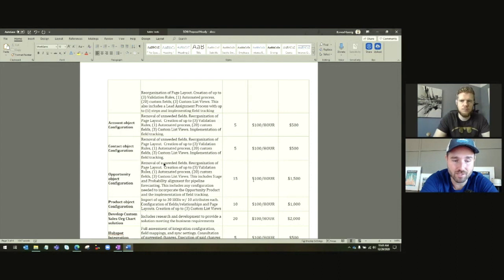So for me, product object configuration, unless you know something I don't know, that's like 2 or 3 hours, because they're on the hook. Now, if you need to have a meeting to help them define what their products are, that's different. But otherwise, they should just be saying, hey, here's a list of products, and can you make sure that these are available to be selected when we're adding products to an opportunity? So that one's easy.